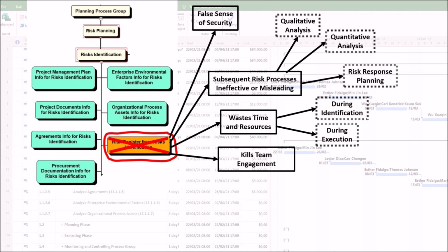to speak up again. If it becomes a blame list, if risks are written as "the developer might make a mistake" instead of "due to unclear requirements, the code module might contain defects," it creates a culture of fear and blame, discouraging participation. If it's seen as a bureaucratic exercise, when the register is filled with trivial items, team members lose faith in the entire risk management process and stop contributing meaningfully.